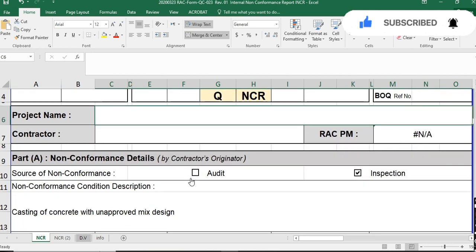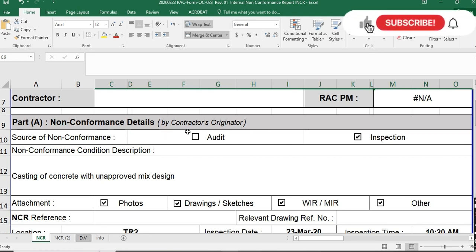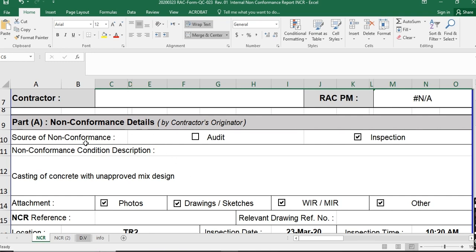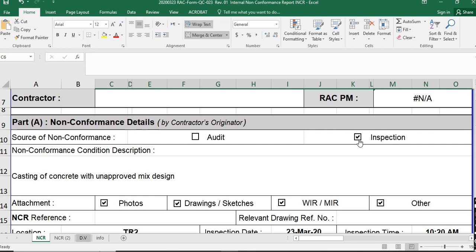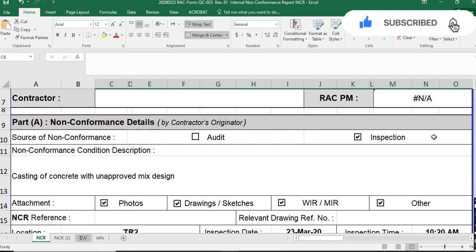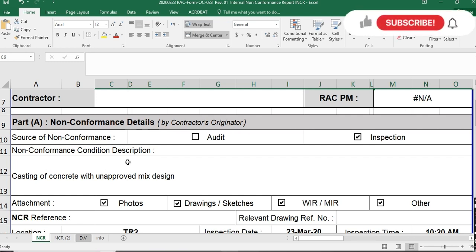This part covers the general requirements of the NCR. In Part A — non-conformance detail by contractor originator — since this is an internal NCR, all NCRs should be issued and closed by the contractor or subcontractor. Here you have to choose the source of non-conformance: how you found it, whether by audit, inspection, or surveillance. Mostly you will click on inspection, but you can also click on general surveillance.